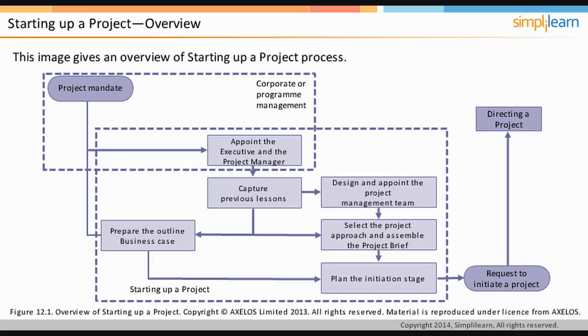There are other parallel activities which occur during the same time, and one of them is preparation of the outline business case. Finally, the project brief is assembled and the plan for the initiation stage is prepared and submitted to the project board. Let us next look at the activities involved in starting up a project.